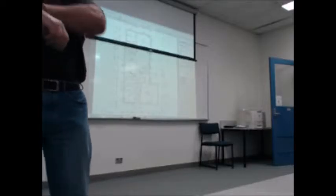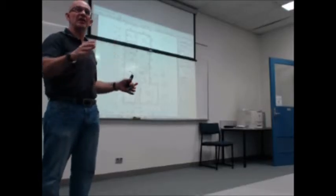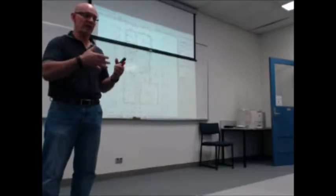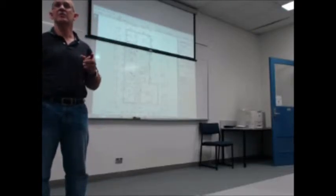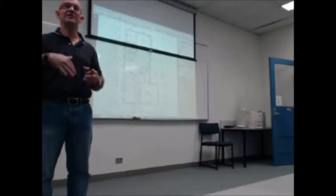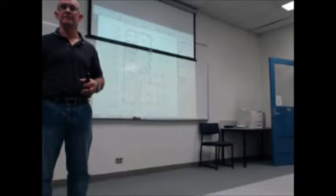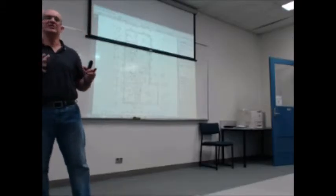remember, when this usually happens is pre-handover. The house has been cleaned, everything's been finished. The builder and the client get together to do the walkthrough, and he is going to note whatever the client picks. And then he's got to try and get himself out of jail. He's got to explain standards and tolerances, whether it is or it isn't. If it's outside the standards and tolerances, the job is not going to get signed off. He is not going to get final payment. You want to move in, you're renting somewhere else. This is the catch 22.